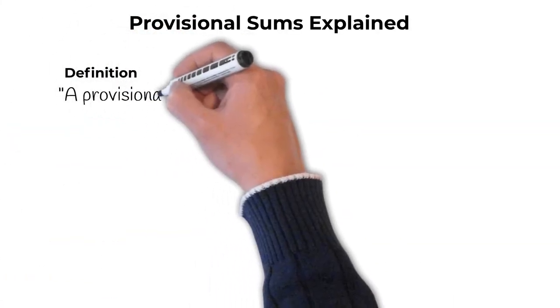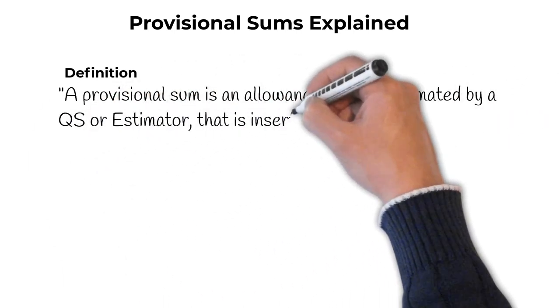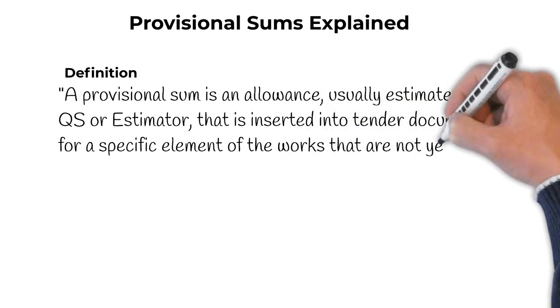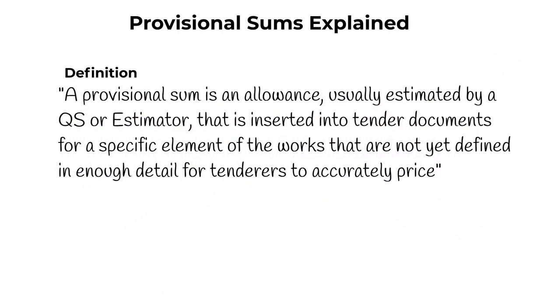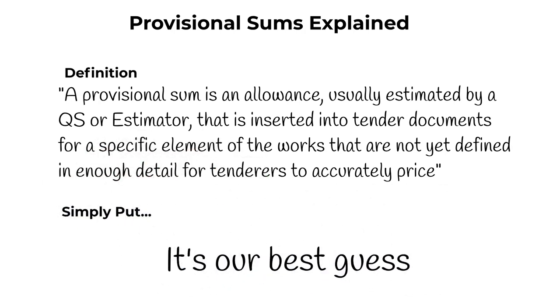A provisional sum is an allowance usually estimated by a QS or estimator that is inserted into the tender documents for a specific element of the works that are not yet defined in enough detail for tenderers to accurately price. In other words, it's our best guess and is usually included as a round figure.